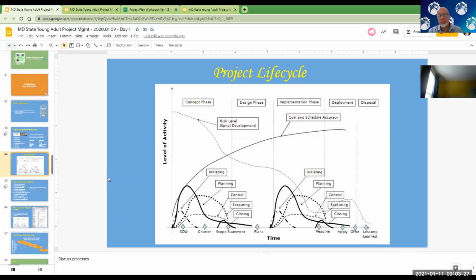Then we went to the concept of a life cycle of a project, that projects have initial phases, or phase 1, 2, 3. These phases could be broken down depending on what makes best sense for the business or the objective of the project. In cases, for example, of IT upgrades, if you're doing an upgrade across an organization, let's say 10,000 employees, you might decide to do it in 5 stages, 2,000 each, or you tackle certain regions first and then others later, and so on. But within each phase or stage, we discussed that you deal with it as if it's a project in its own. It could have its own initiation and its own closing, with everything in between.